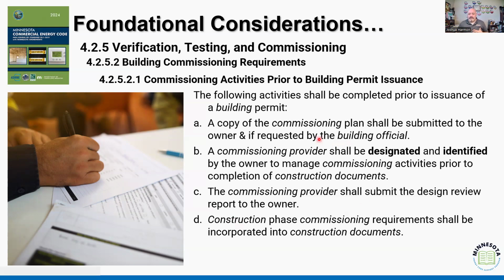What we're looking for is, again, we want a commissioning plan. We want a plan very similar to, my brain always goes back to, a special inspection report, right? I need that special inspections plan. I need a commissioning plan that tells me what is the expectation and who's doing what, right? That we've both identified who's going to be providing that level of review, that they're aware that all of these questions and answers are addressed before we get started.